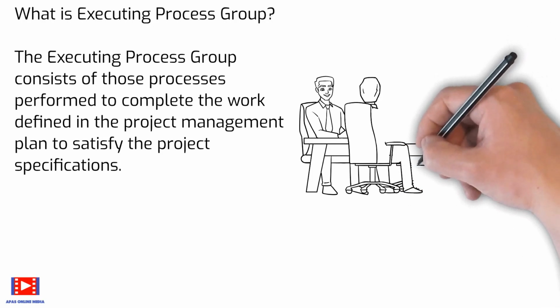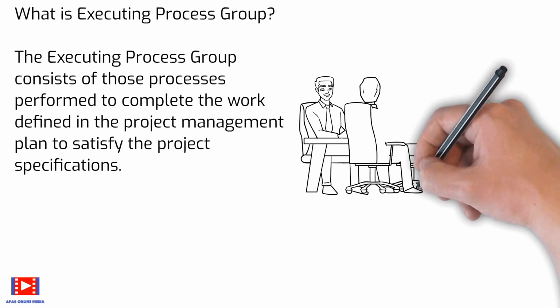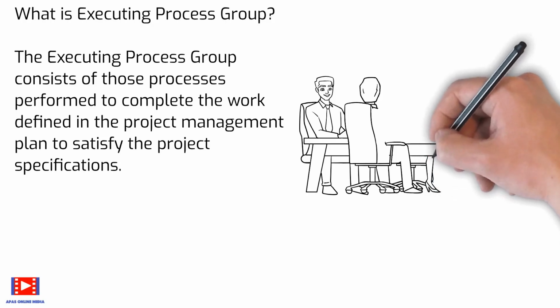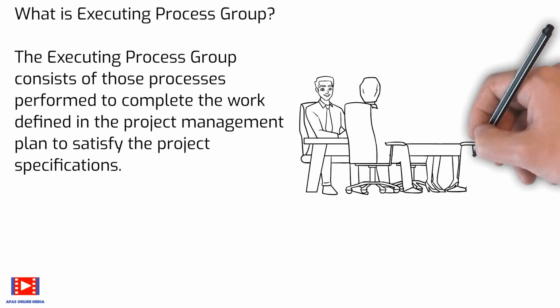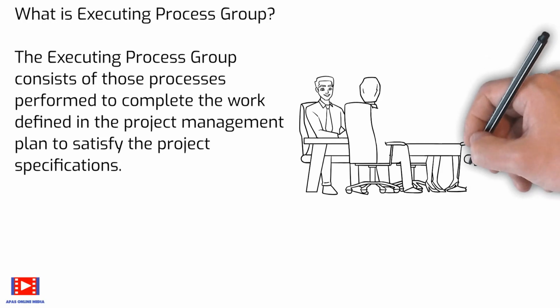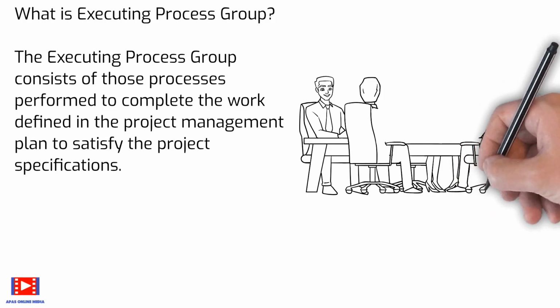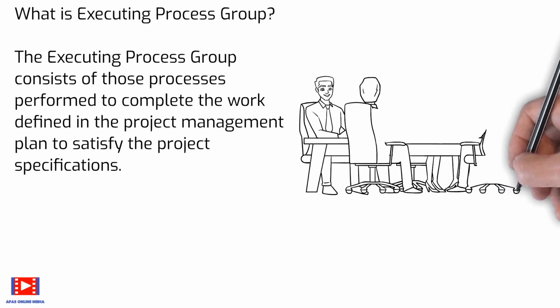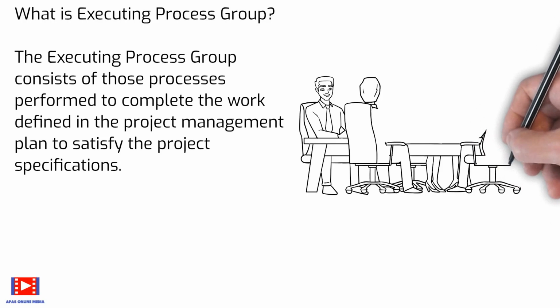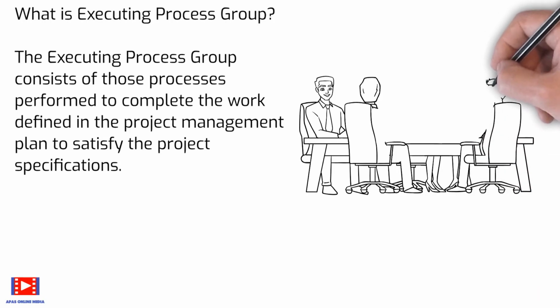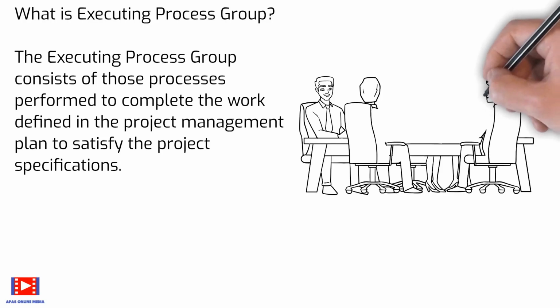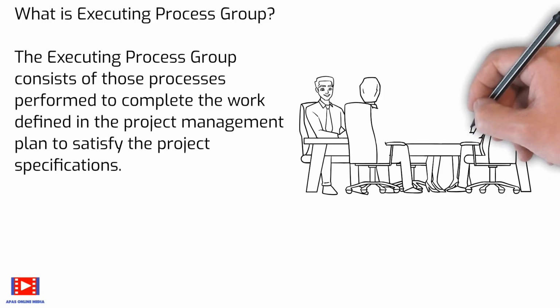During project execution, results may require planning updates and re-baselining. This may include changes to expected activities, durations, changes in resource productivity and availability, and unanticipated risks.